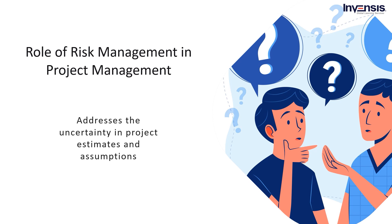Instead, it requires that project management processes such as scheduling, budgeting, and change management be performed at the level of best practices available. Risk management adds the perspective of project risk to the outputs of those other processes. For example, risk management provides the basis for estimating the amount of cost and schedule contingency reserves needed to cover risk response actions to a required level of confidence for meeting project objectives.